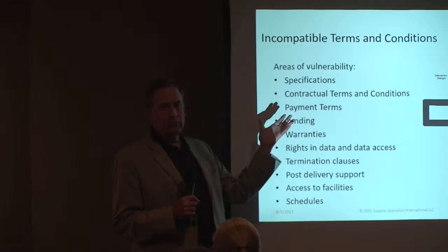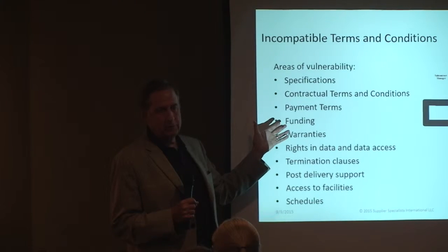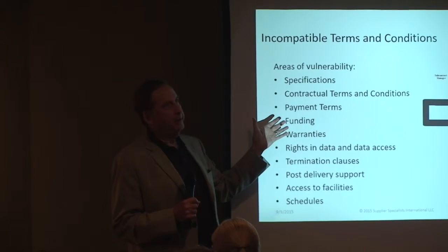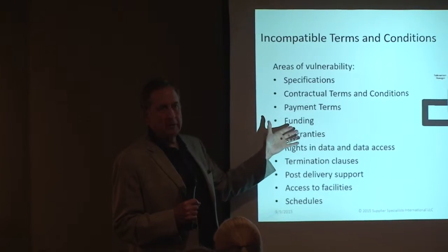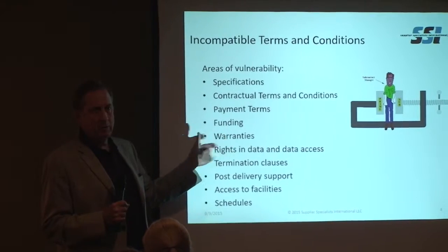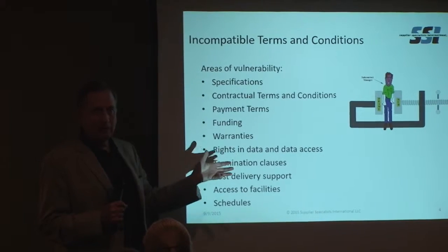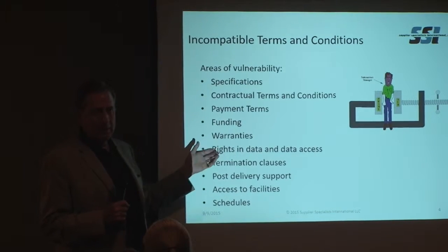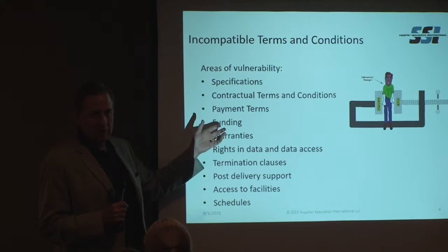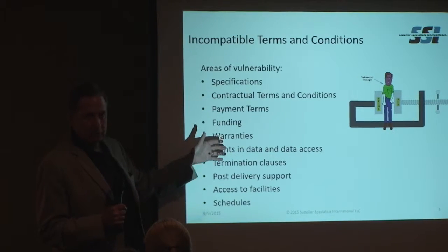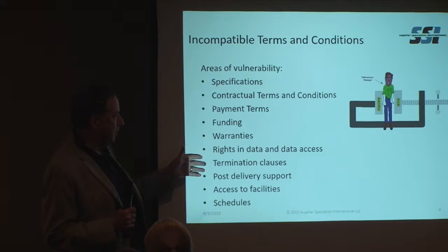Well, what if your customer imposes special terms that require a 24-month warranty and you flow down an 18-month warranty? If the product fails at your sub, you may be on the hook to fix it, but if you haven't flowed that down to your sub, it's going to come out of your pocket. So those are some of the areas that you really have to be careful about.